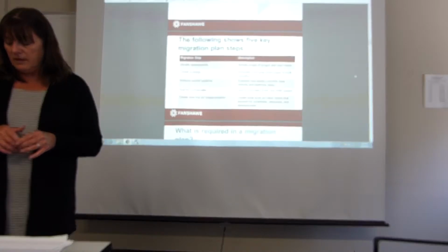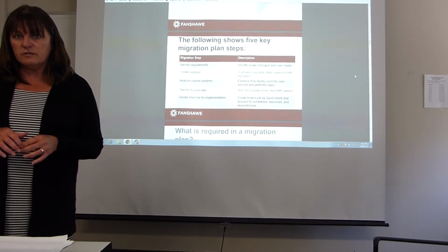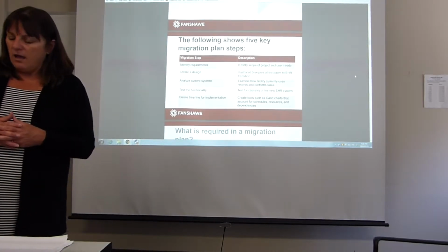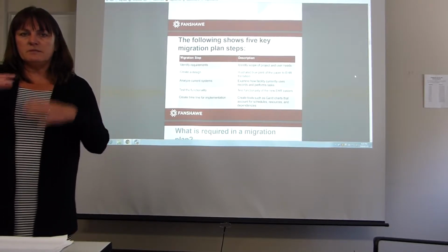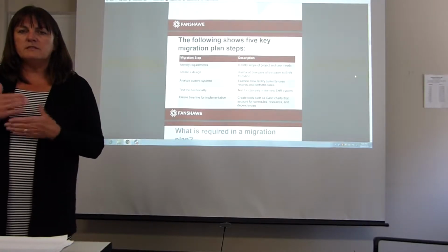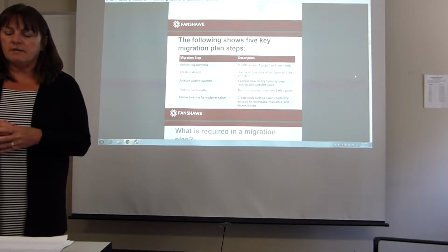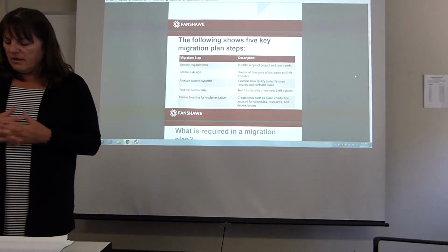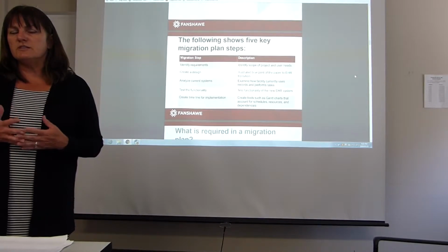We use a test domain, typically, and we also involve the users in the testing of the new system. It's usually called user acceptance testing, and the scripts or the process of that testing is usually what designs the training content, the curriculum. And create a timeline for implementation, and to do that we use project management tools, such as a Gantt chart.